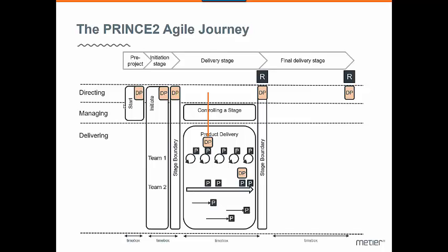So they're not working on products, they're not coding software or whatever they're doing in this project for the last sprint. For the last sprint, it's a sprint where they're working in managing stage boundary. So they're finishing up. They're making sure stuff is getting released to the user. There may be some issues to deal with there, and they are planning for the next stage.